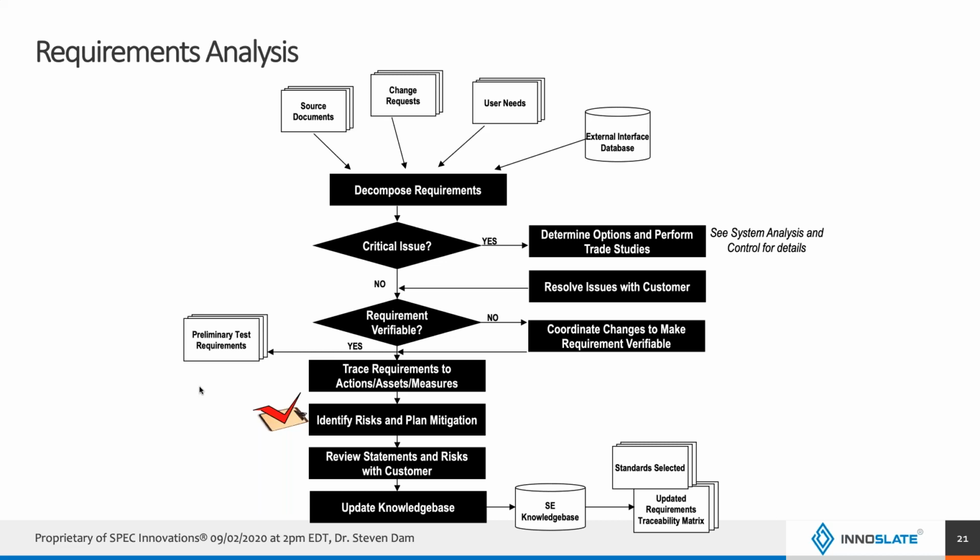Okay, again, in all this process, I've got to identify risks into my risk management. Remember, the program management might be managing the risks, but they don't identify the risks, particularly not the technical risks. They might identify cost and schedule risk, although again, they may not even have any insight to that until the engineers say, hey, we're not going to meet schedule. And here's why.